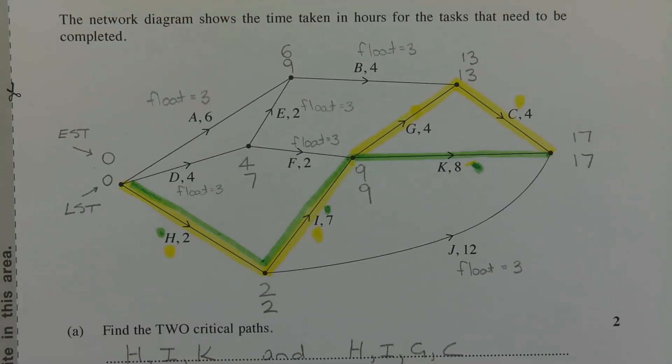We need to identify one task on the critical paths that we found in Part A in order to reduce the total activity time by three hours. In other words, rather than finishing at 17 hours, we finish in 14 hours. So if we look at both critical paths that we found in Part A, we have H, I, and K, and we have H, I, G, and C. What we do notice is that H and I are common tasks on both of those critical paths.